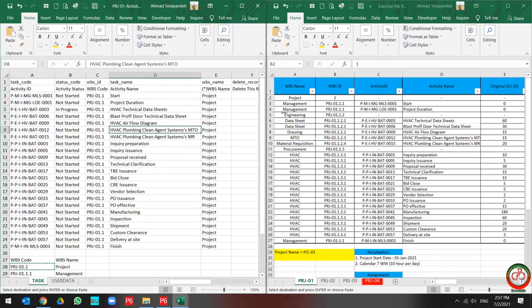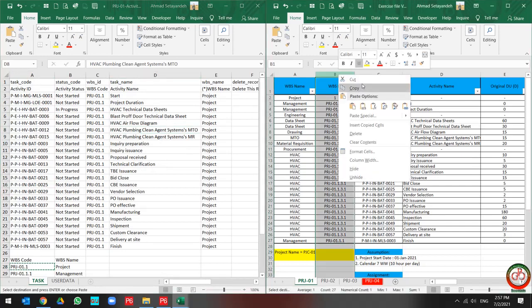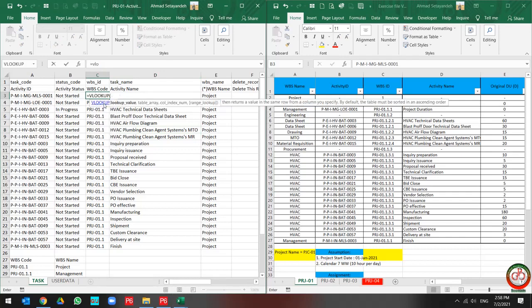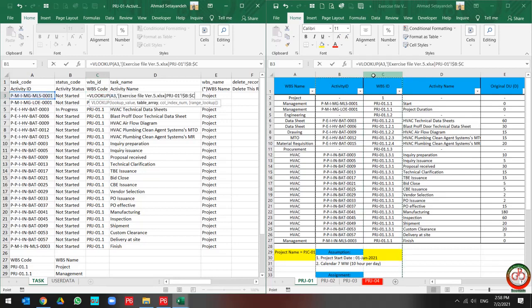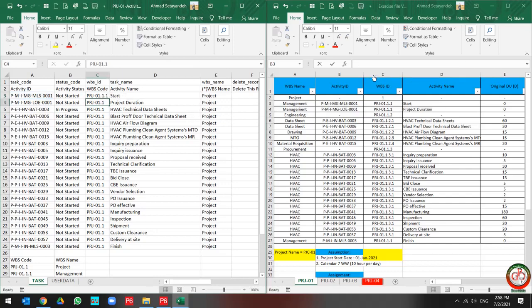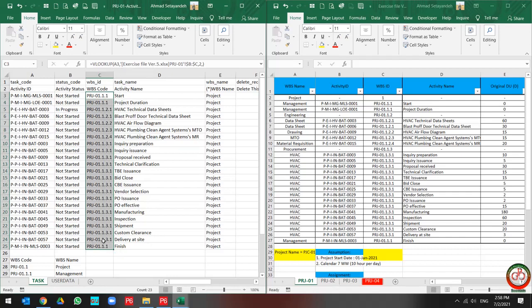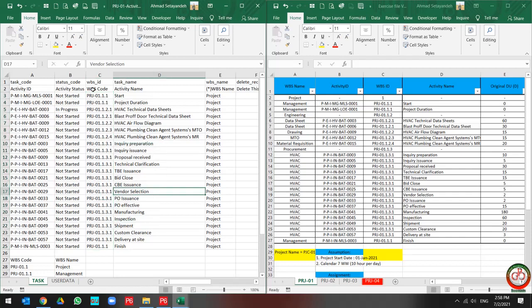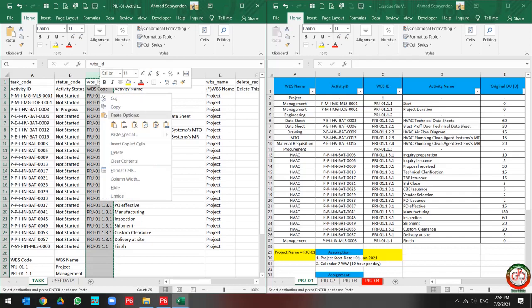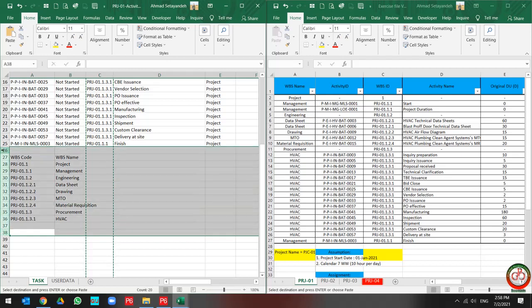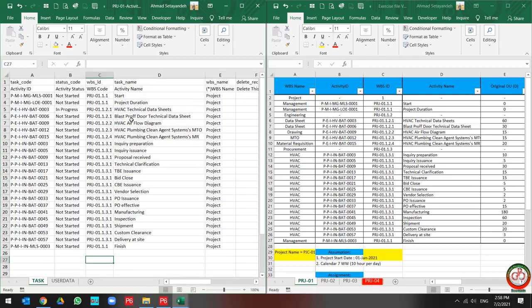Right now, I want to do the VLOOKUP. I need to change this sort and set it equal to VLOOKUP by activity ID because the activity ID is unique — from column 1 to 2. All of my WBS IDs are replaced. Now I need to do copy and paste as a value, then remove the extra information and save the items.